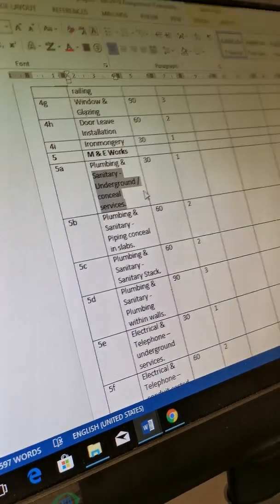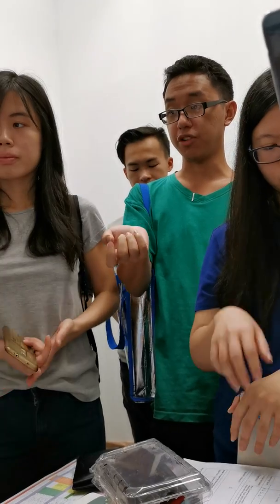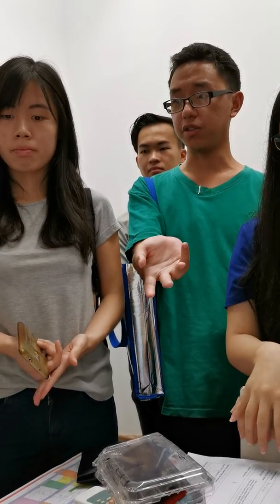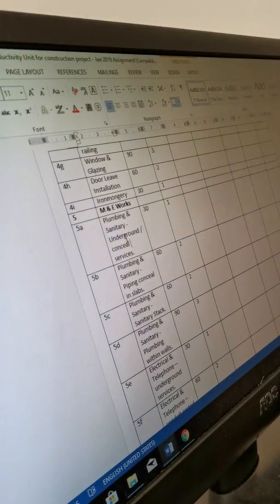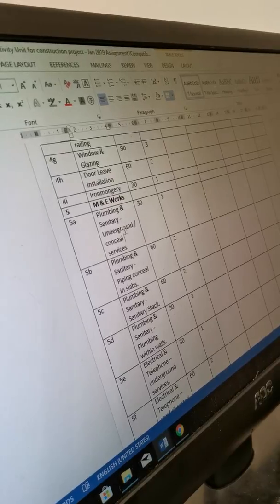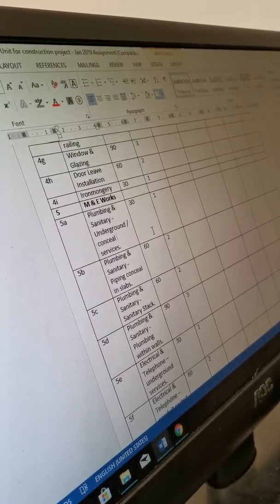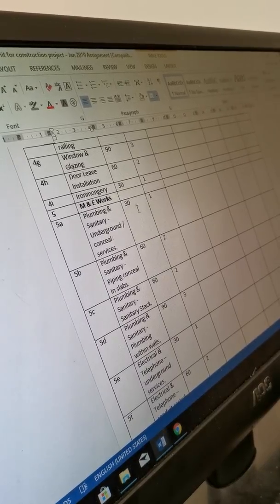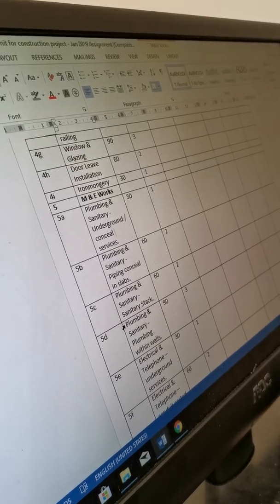So it's like the types of sanitary fittings that we choose or sub out to the subcontractor. Whatever. In AON we don't have to include it already. But you still need to include whatever they say, and you add the NSCs. The NSCs need to come in also, because you tell them when the NSCs will come in. It doesn't mean that you don't do it, but in your planning, who comes in is not your own people. The NSCs must come in already.